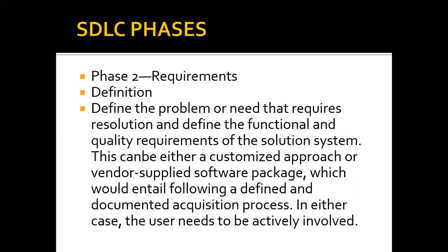Fine. So if we are through with phase one, which is the project feasibility, the next stage is the requirement definition. We have now agreed that we have a problem that software can solve. Now, what are the departments that need the software? We need to know the departments that require this software. Then we need to gather their requirements: legal requirements, contract requirements, business requirements, security requirements. All those requirements will be gathered from all the users.